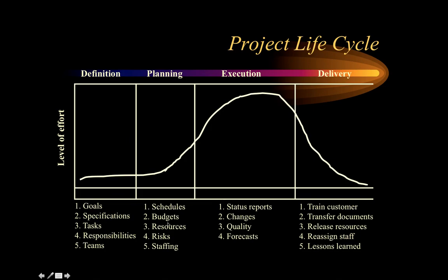Then in the planning stage, we look at scheduling and budgets and resources and risk and staffing issues. So, when will each activity start and hopefully finish? What kind of budget resources we need, and we need to allocate that. What kind of other equipment and other types of resources, human resources, we need as well. And then the anticipated risks that we need to plan for.